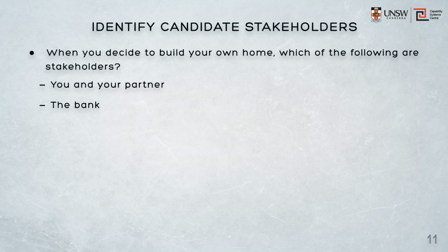It does not have the right to dictate any aspect of the house design. Since it does dictate the budgetary limit of your aspirations, they quite clearly provide a number of external constraints on the project, but they are not stakeholders and you will not engage with them during the project, providing you don't default on your mortgage or need to apply to exceed its current limit. Well, what about your children? Well, you'll certainly take them into account. They will have rights, but those rights are significantly moderated by your desires and, of course, your budget. In some cases, such as the right to choose the colour of their room, you may give them limited stakeholder rights, but you're not likely to do that when deciding on the inclusion of a swimming pool.